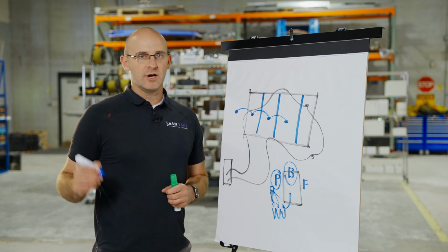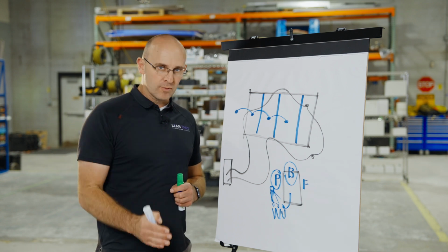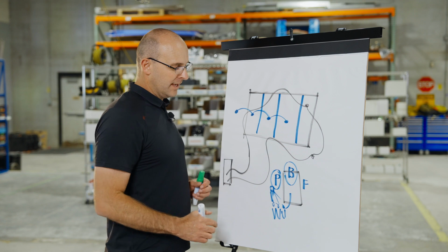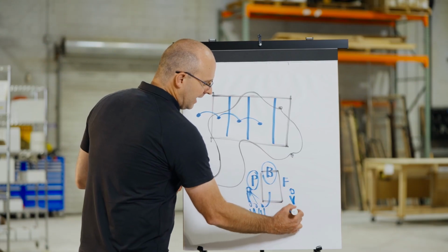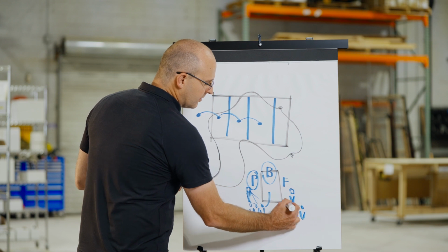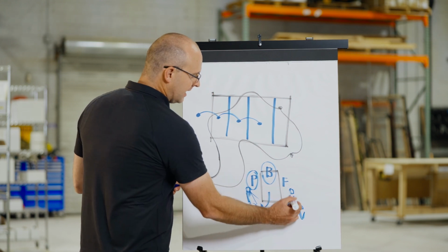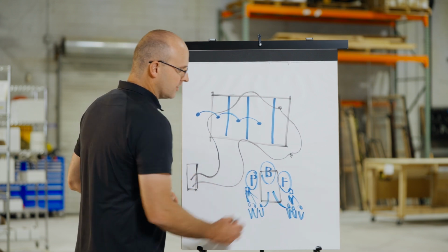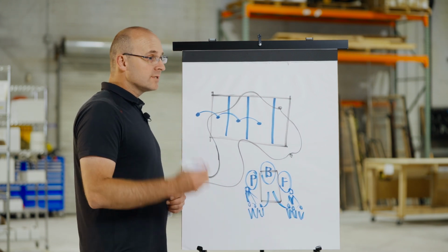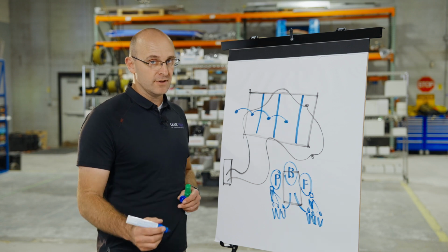We fix it as we go. We make sure that it's installed right the first time in that zone. And then the foreman or the crew leader at the end of doing that work will gather the crew and say, hey everyone, did we finish that properly and what lessons were learned from building that? That is what's called one process flow.